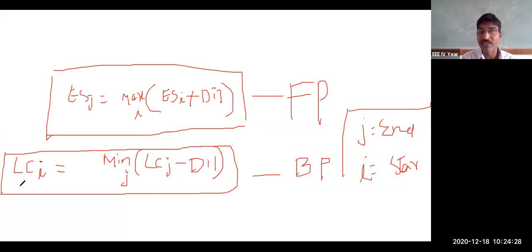Now if you have any doubt, you can ask. Just now you can ask, because I need to show. So friends, till now I'll explain. In PERT, time is not known, it is probabilistic in nature. So PERT is used for new projects and R&D projects, innovative projects. The project manager will estimate the time based on 3 estimates. One is optimistic time, second one is most likely time, and third one is pessimistic time. Those values are already given.